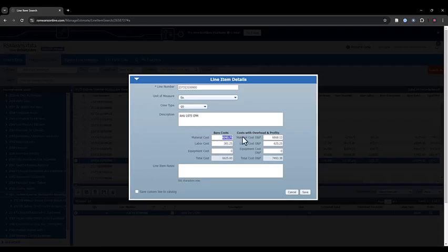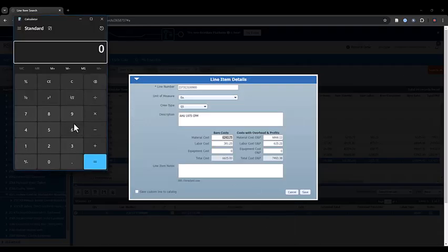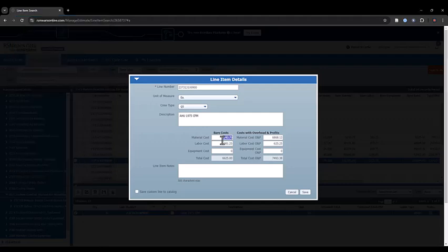So for the material cost, the easiest way to estimate that is to use the ratio. For example, you're going to cross multiply then divide. So I'm going to do 6243.75 multiplied by 1600 divided by 1975. Okay, so I'm going to have this one.